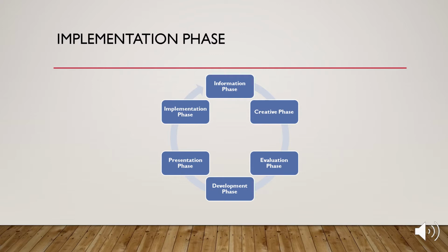Once you've completed the information phase, creative phase, evaluation phase, development phase, presentation phase, and are now into the implementation phase, again, you can repeat the entire process and provide savings on the next phases of the project. The only problem is that the potential cost savings decrease again with the progression of the project.